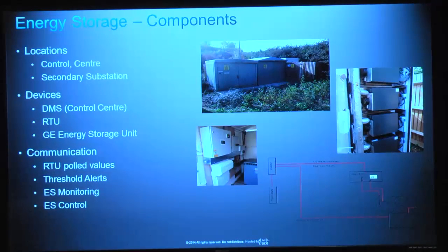So again, you can see here what the battery shed looked like. It was quite large, effectively adjacent to the substation itself, and this proved to be a level of problem, particularly with community concerns where they didn't want to see another shed or another large structure being installed in effectively what were community suburbs, etc. So it was proving to be a problem.